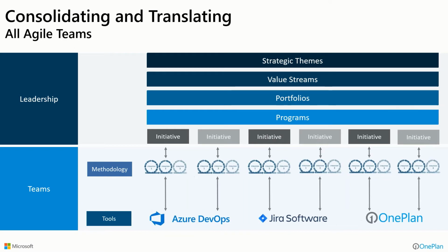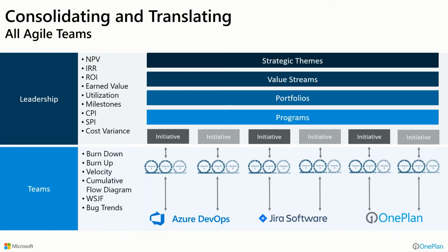Now, even if organizations get completely agile across the board in execution and do all things agile across the organization, challenges still exist. Portfolio visibility in the agile world is not necessarily something that's inherent with the tools you see down there like Azure DevOps and Jira. On top of that, teams may be looking at the way they progress things and their status in different, more agile terms like burn-ups and burn-downs and velocity charts and things like that, where leadership might still want to see the language of the business, more financially oriented, and when we're going to deliver things. We want to see dates and commitments and those types of things. And the idea is we have to bring this stuff together, and there are mechanisms within OnePlan to do that.